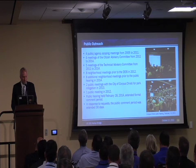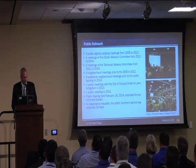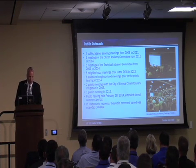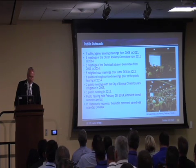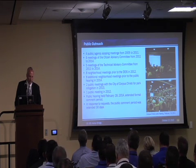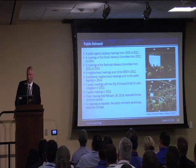From 2005 to 2011, the Corpus Christi district had 4 public agency scoping meetings. They formed a citizens advisory committee, which met 6 times during 2011 to 2014. During that same period, they also had a technical advisory committee, which met 5 times. Prior to the draft EIS in 2012, they had 8 neighborhood meetings.